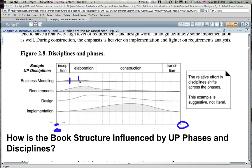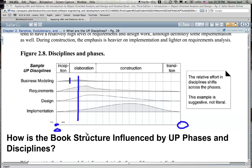If you cut across the diagram at a given day or week, that tells you how much time or effort is being spent. For example, we have a team working on business modeling spending that many hours, a team working on requirements spending that many hours, a team working on design, a team working on implementation, and if you go back to the previous diagram, a team working on testing and so on.